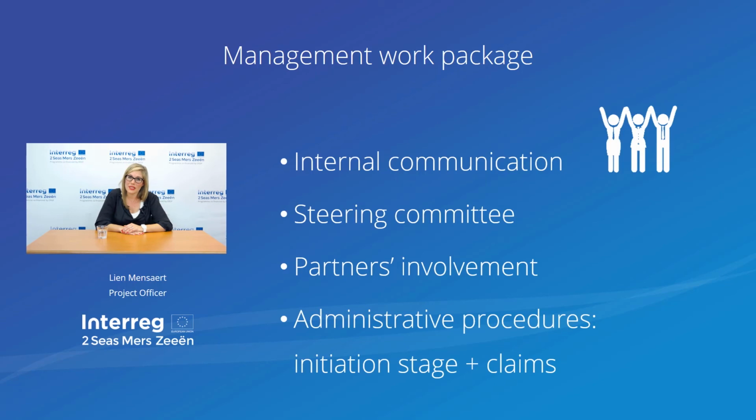And then there are obviously the administrative procedures that every project has to respect and that will also need to be integrated in this management work package. To start with, there is the initiation stage in which you will have to deliver several documents and contracts and also make the main agreements between the partners to ensure a very smooth startup for the project. And then throughout implementation, there will be claims, financial claims, and there will also be annual progress reports that you will have to integrate in your management work package.